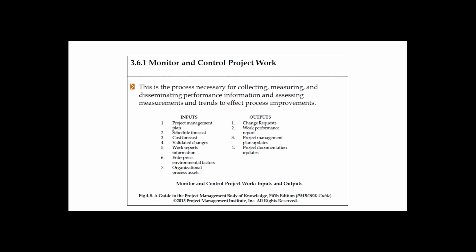Since this is integrated change control, we need to assume that the individual knowledge areas have been taken care of, and you feed into the integrated management process. That's why you have a schedule forecast. You will review if there are any changes, and if there are, you will review the schedule forecast. That means this change has impacts on the cost and schedule. That is what calls for a schedule forecast.